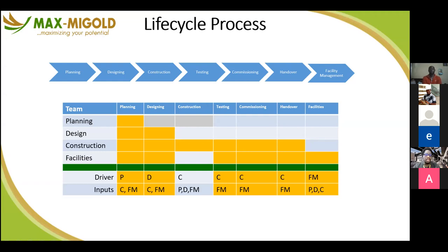You see a design and you're carried away without thinking about how meters are going to be installed, how the cabling should support individual and independent metering for each client so you can distribute proper bills, or they use prepaid meters in their locations to pay their bills correctly. After you have built, you now start wondering about those are the things that should go into design.